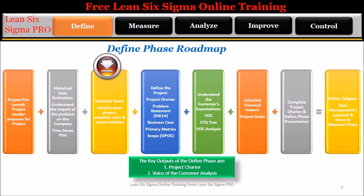Step 3: Establish team — identify team players, establish team roles and responsibilities. Step 4: Define the project. The team will begin to create the first four elements of the project charter: problem statement, created using the 5W1H tool; business case; primary metrics; and scope, created using the SIPOC tool.